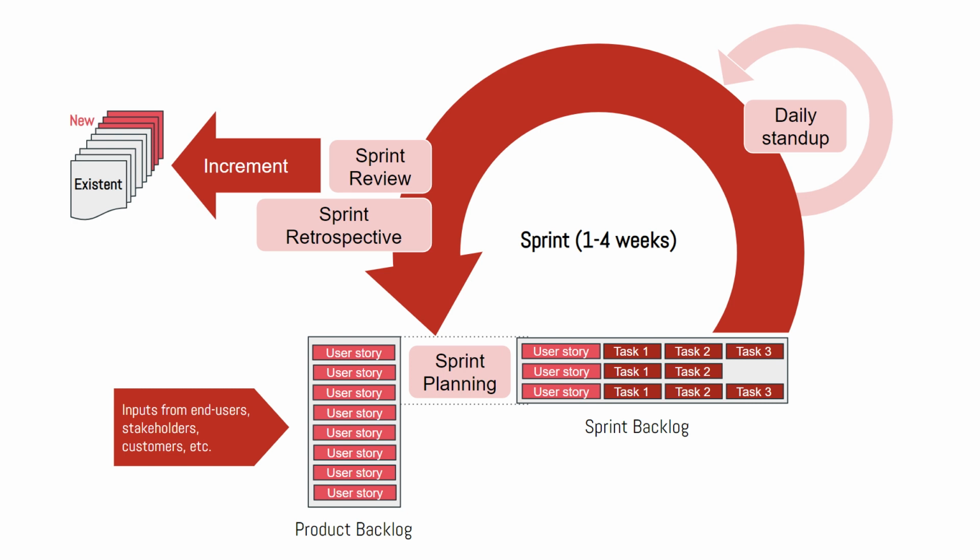In Scrum, we have three artifacts: the product backlog, the sprint backlog, and the increment. Product backlog is the responsibility of the product owner, but anyone involved in the project could create a user story, but the product owner is the person who validates and prioritizes these user stories.